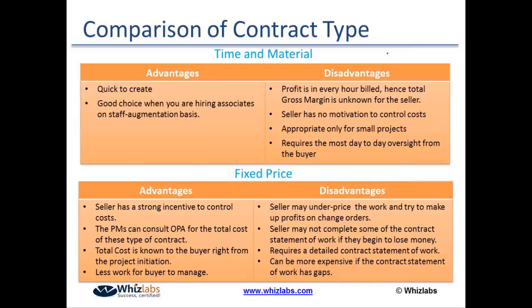Coming back to the time and material contract, yes, it is quick to create and it's a very good choice in case you're hiring associates on a staff augmentation basis. But the profit is on every hour billed. Here, the total price is not known to the seller. So the seller would try to sit on the project, simply delay the work, and would earn more profit.